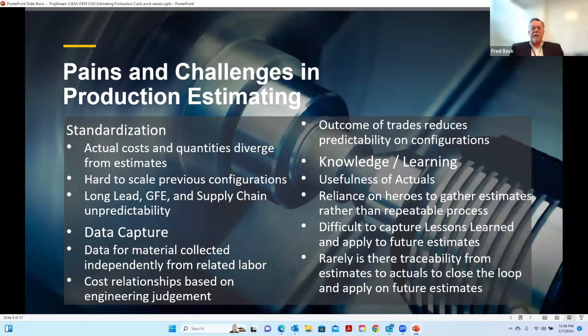Supply chain issues, parts acceptance issues from your quality team, not getting the quality parts that they need, and I like to say part supply too, because outside of the supply chain, you might have situations where parts have been revved and you're unaware of it. You get the updated rev that you ordered, the last rev worked fine and the new rev doesn't. And so there's a lot of these things that force you to have to go back and diverge from your original estimate.